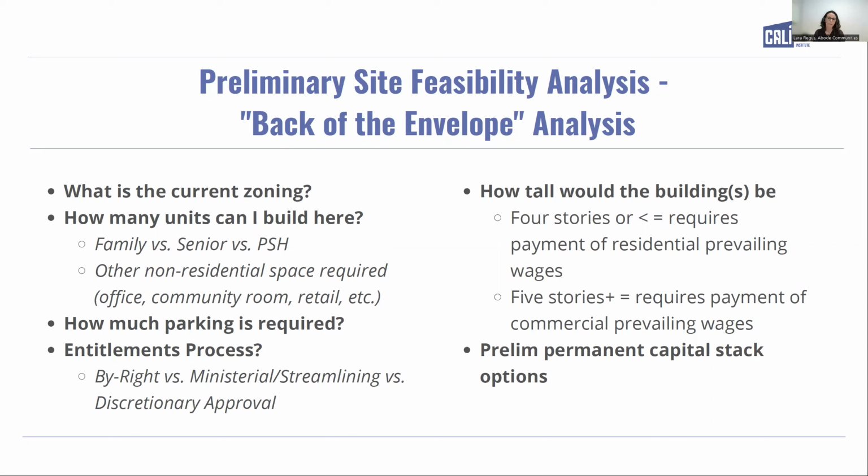In the meantime, back to what you're trying to visualize on the site. Height is important here, and again, this ties back into cost. If you're thinking about doing a family project, can you fit it in 4 stories or less, or will it require going to 5 or more? That has an implication on some costs for your project, but you also need to think about height limits and whether what you are planning to build can fit there by right, or if you'll need to go through a process to get those extra height stories.